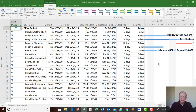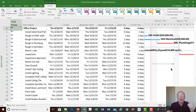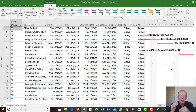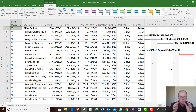What's done is done — now we're going to look to the future. In this recovery schedule I don't care what happened in the past; I documented it and listed the reasons. If I was doing a multi-story building and one floor was delayed, I'd want to know if that's going to happen on the next floor and how to prevent it. You're using the lessons of history to help plan the future — that's continuous improvement.